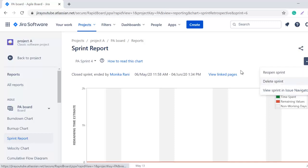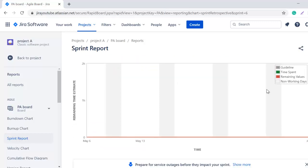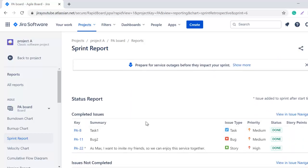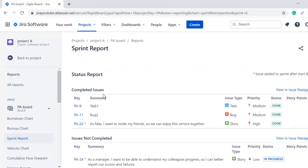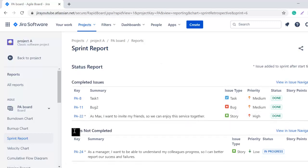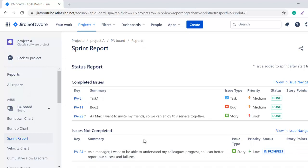Let's go now and see this is the burndown chart that we have in our Sprint Report. As I told you in the burndown chart, in the horizontal axis we have time and in the vertical axis we have the estimation statistics. Now you will go down and you will see the completed list table. There are three issues which are completed in this sprint. We have the issue key, summary, and issue type. These are the issues not completed, and issues added after the sprint starts are indicated with an asterisk. You can see here.